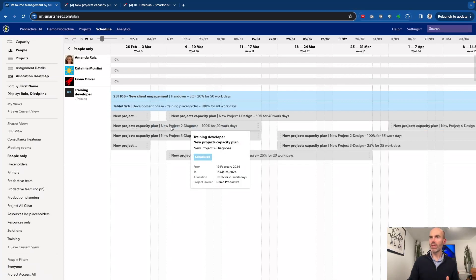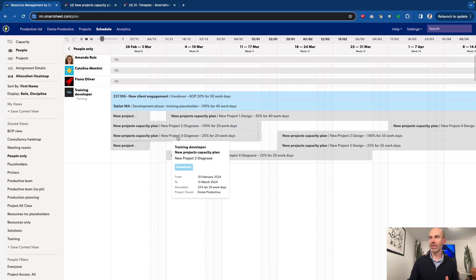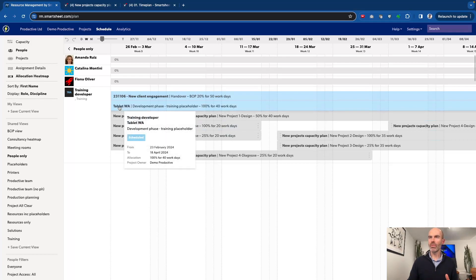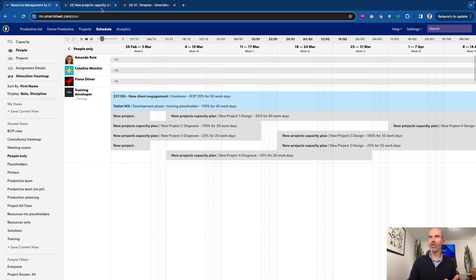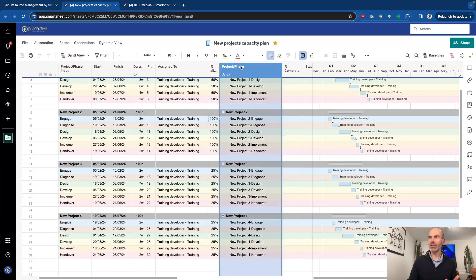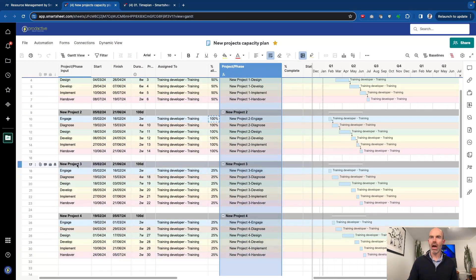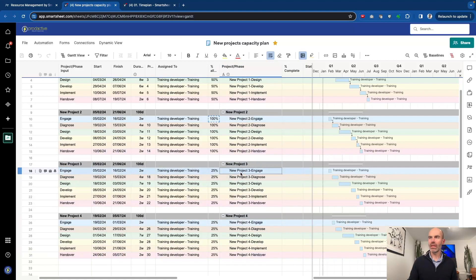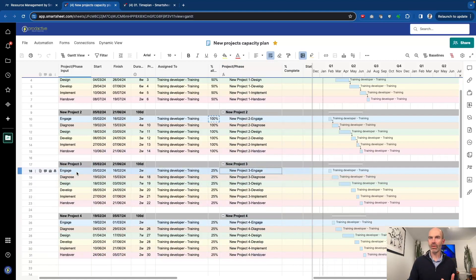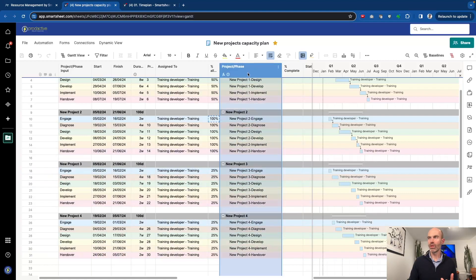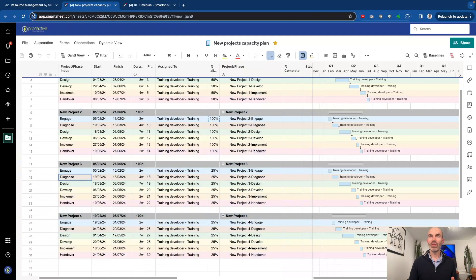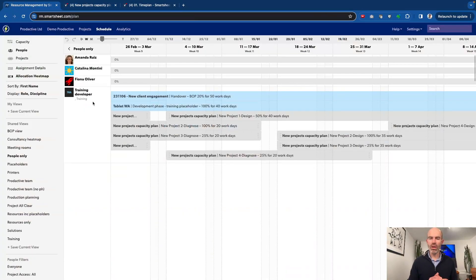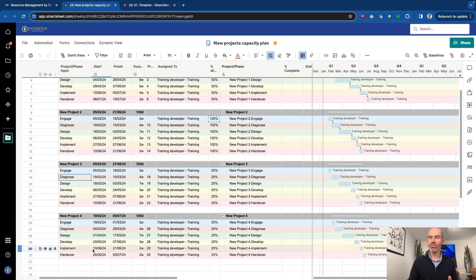You want to see is the new projects capacity plan. We can see that it's project two diagnose or project three diagnose. When things come through in resource management onto this view, you see the project name and then you see what the task is. To make that work, rather than having to type it out each time, I put the name of the project, and then this is a formula which joins the name of the parent and the actual task. That's why you'll see this column duplicated, but it means it works so much better in resource management. Your whole point here is to be doing capacity planning. This is quite an easy way to do some scenario planning.